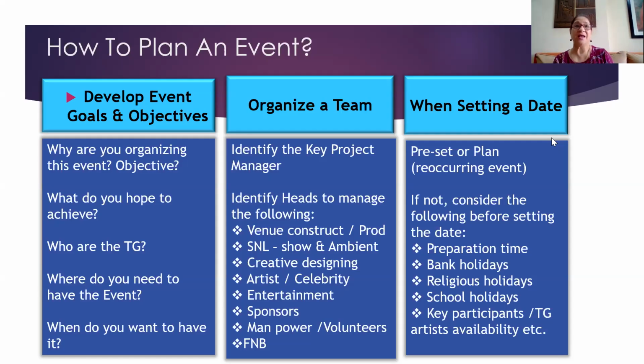Okay, that's why lights generally are perched up 2 days before the show. 1 day before the show, there's a proper sound and light technical rehearsal that happens, so that we know how we're going to be looking at this and how is it going to be looking on the day of the show.